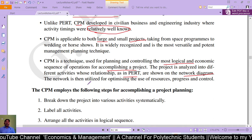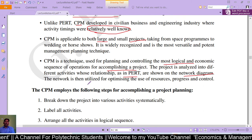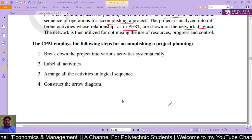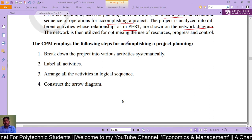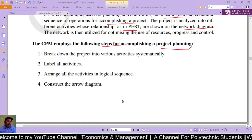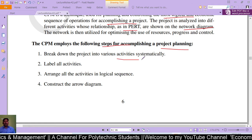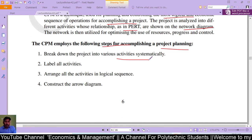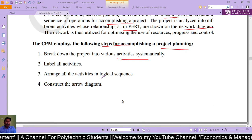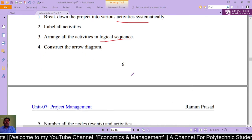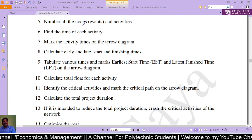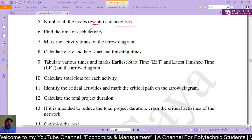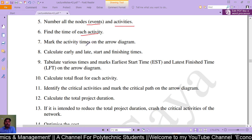CPM employs the following steps for accomplishing project planning. The first step is to break down the project into various activities systematically. Then label all activities, arrange all activities in logical sequence, and construct an arrow diagram. Then number all nodes, events, and activities, then find the time of each activity and mark the activity times on the arrow diagram.